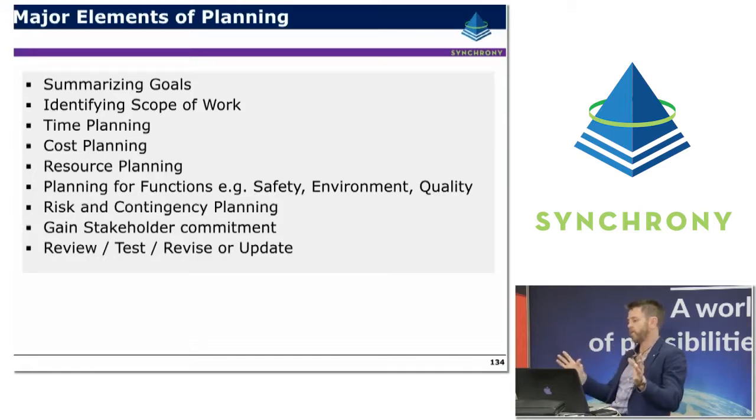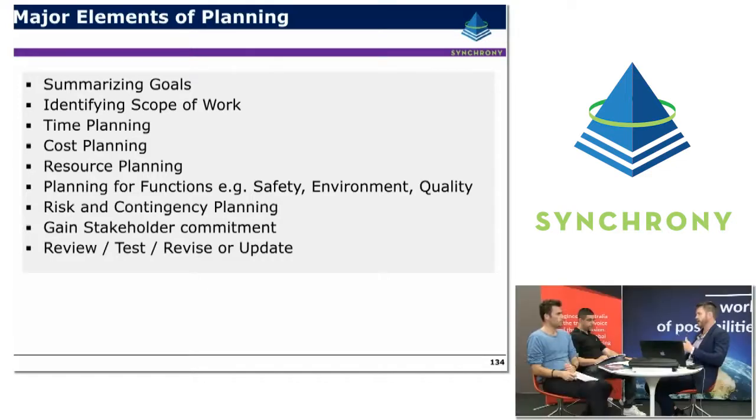There's the right level of support from a safety perspective. The safety function is happy with the overall plan. From an environmental perspective, the same thing, making sure that the right hold points might be in place, the right audits are in place. Quality, making sure the right witness and hold points have been identified in the schedule, and that the quality function is happy with the overall flow of the program as well.